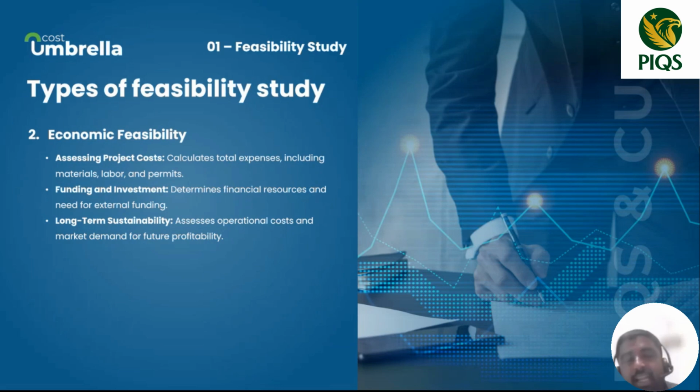Obviously, economic feasibility. This has three aspects, right? Economics means, as I told you, you have a limited amount of money, time, or resources, but your desires are big. So you have to match this. Then only it will be implemented, or moving further. So you have to identify how much you need, like a simple estimation. Even this very high level estimation is part of the economic feasibility.